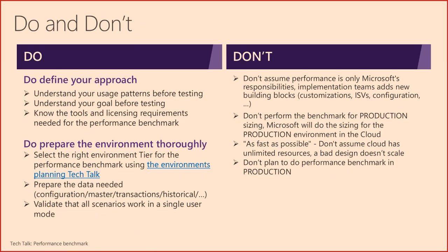And continuing on the environment, you need to make sure that you're going to select the right tier that will have sufficient power to cover the transactions mix and the number of simulated users. Also, as you have your scenarios, define really what would be the minimum data needed in the system, whether it's configuration, master, transactions, historical, to plan time for that.